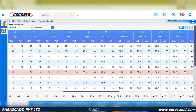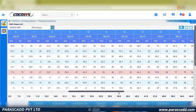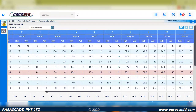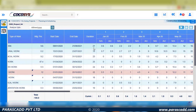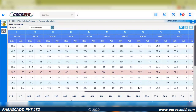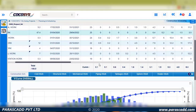Since the duration is 21 months, 50% will come at 10.5 months — you can see 46.3% at month 10 and 53% around 10.5 months, achieving exactly 50%. At the 14th month, which is two-thirds of 21 months, 75% progress is represented. This distribution is automatic: one-third of time = 25%, half the time = 50%, two-thirds of time = 75%. The system distributes weightages based on this logic, and it can also be manually edited.